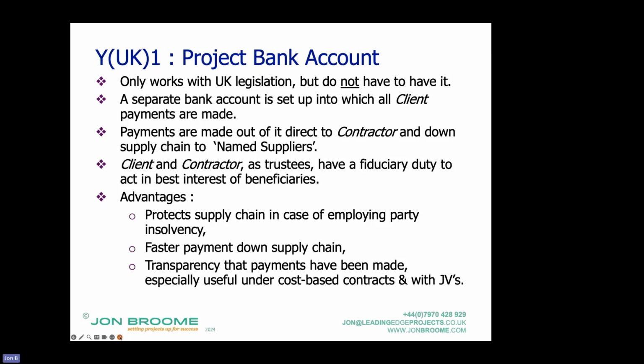During the contract, it generally leads to faster payment because the money goes in and there's much less incentive for it to be hung on to, because it's often the people involved in the contract who actually certify the payment. So the contractor normally administrates it rather than the payments department who hang on for as long as possible. It goes down the supply chain, so it speeds up payment down the supply chain.